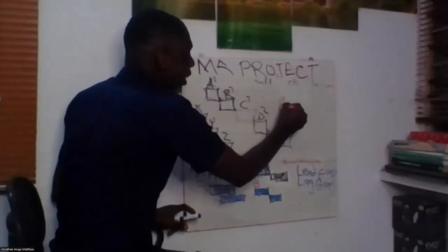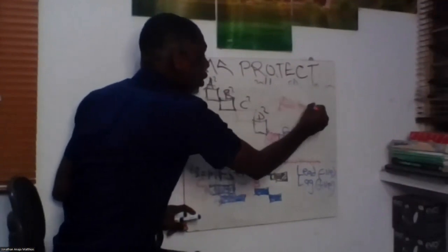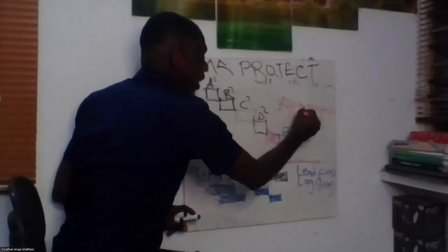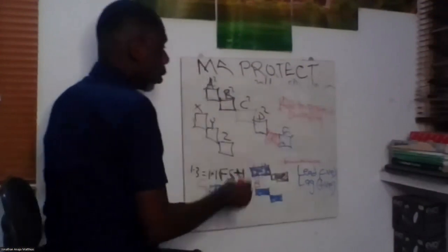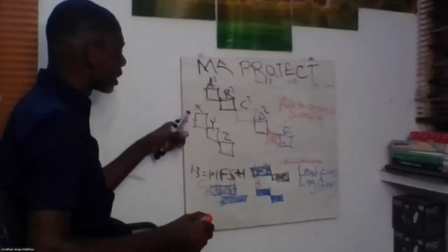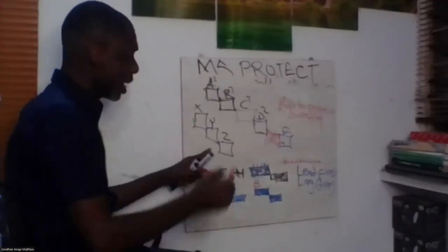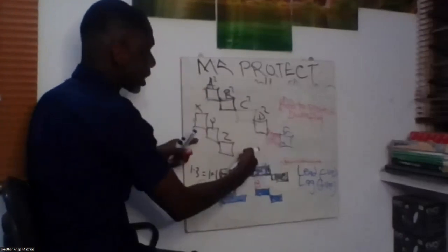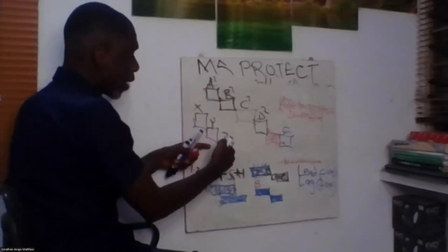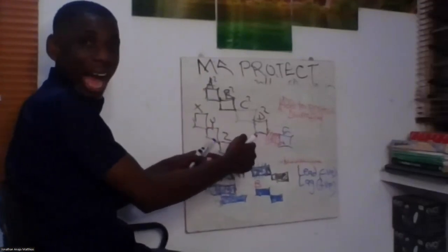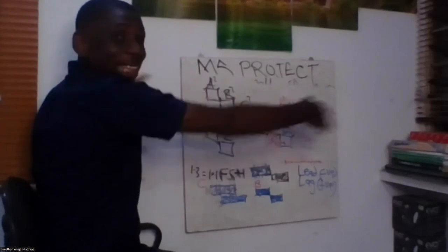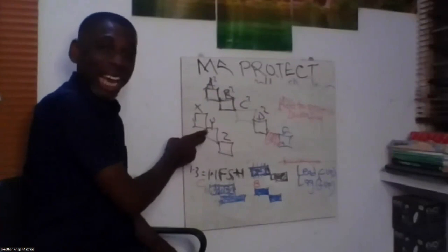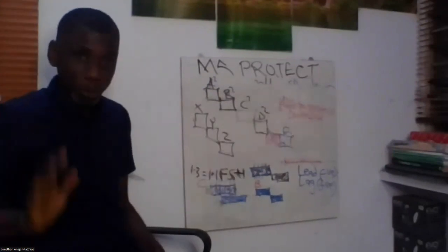it will automatically add to project duration, because this is a critical part. But if I add it here, because this is a non-critical part, even if it is expanded, this is already like 10 days, this is like maybe 4 days. Even if I delay 1 or 2 activities here, as long as it is still within my 10 days, do you agree with me that applying lag here does not affect the entire project duration?